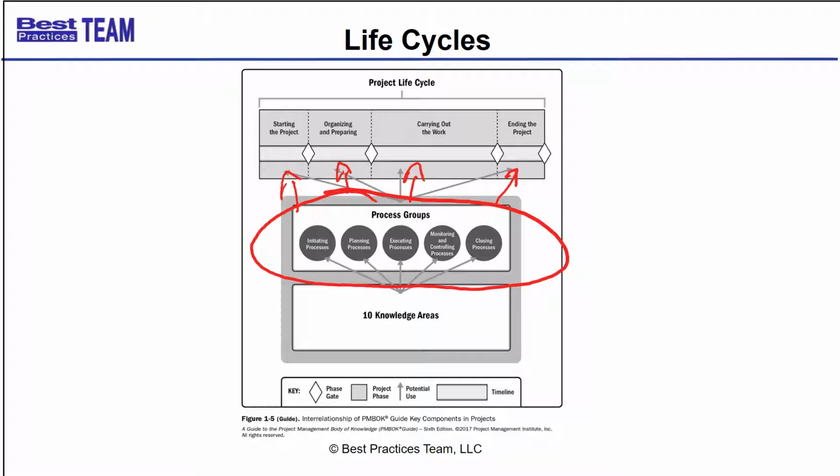So that's clear in the middle phases, the executing phases, that we're creating deliverables, widgets. But why are we executing? What are we creating in the early planning phases? Well, we've been through this before. What are we creating? Plans, documents, blueprints, specifications. Those are deliverables. So even in our early planning phases, we're executing to create those documents.